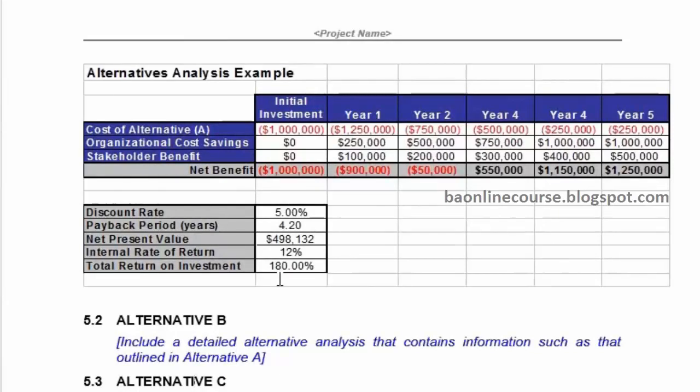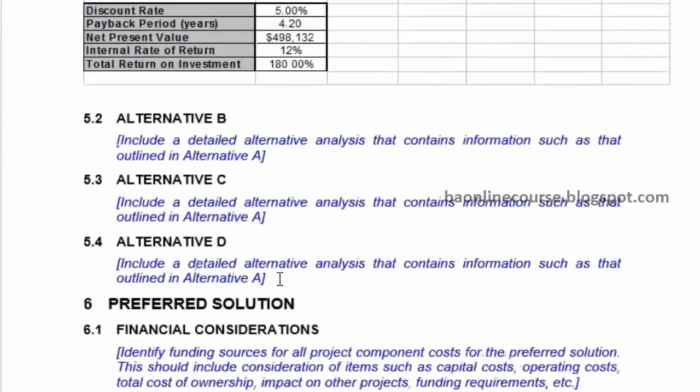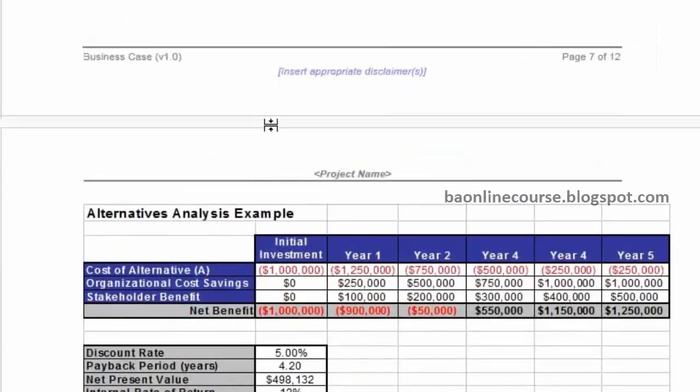All that you would figure out, and then calculate something called an internal rate of return, right? Or net present value, right? So these are the two things which will basically tell you what is the success of the project, right? So basically what we are saying is we are spending $1 million in the first year, right?